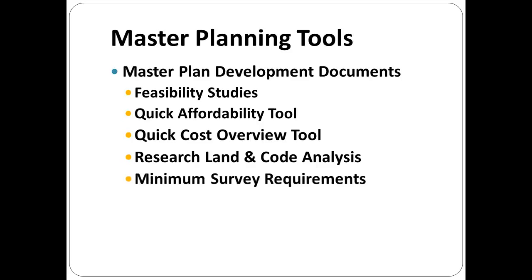You want to get a minimum survey requirement. It needs to be a recent one, and I've given you the requirements here as given to me by industry professionals that tell us what is going to be required, because the engineers and the architect, everyone, the industry professionals, are working off the verification and confirmation of your property and its topographical, the elevation of land as it changes throughout your property, your boundary survey, the location of utilities, of buildings, both above ground and below ground, and any other information that you can get.